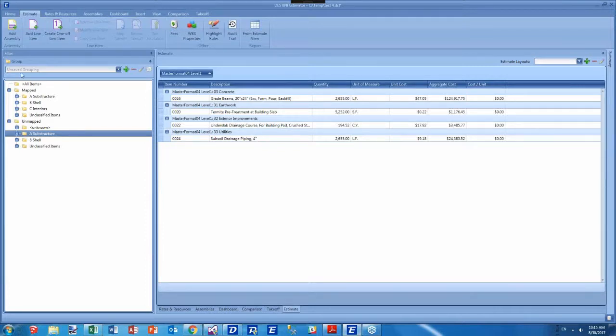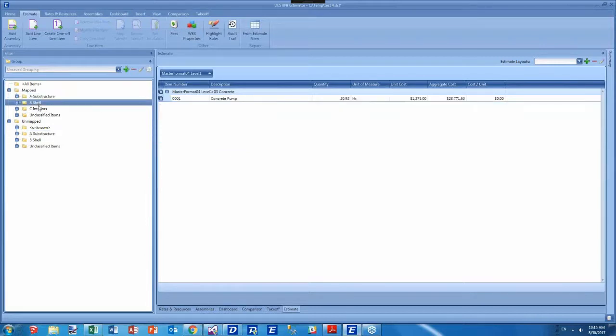And then if I come back to the mapped cost here, these costs have been added to the estimate and associated with quantities. That could have happened either like you saw before, where I picked some quantities and then I added costs, or where I had some existing costs and I came into my estimate view and said, hey, I want to drive the quantities for these line items and these assemblies by my quantity takeoff, and not from manually entering the quantities or answering the questions directly. So this is another way that you can look at this information.